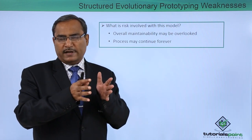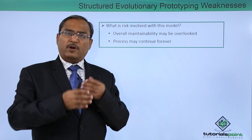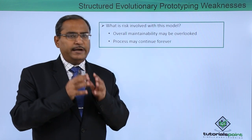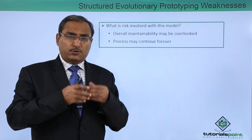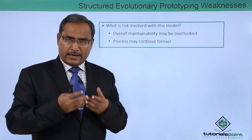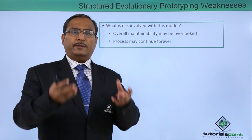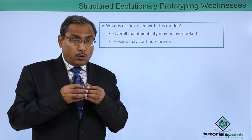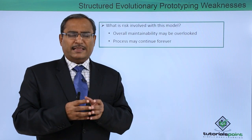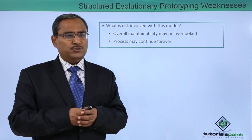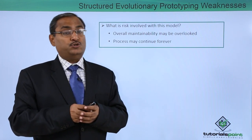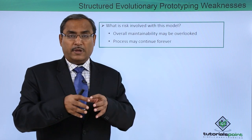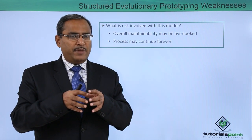During the requirement gathering phase, we have some set of requirements and we develop the prototype with basic and critical functionalities. When the prototype is given to the user, the user gives feedback, and new requirements may also come from users. As those new requirements get incorporated into the present version, the maintainability of the software may get overlooked when implementing new requirements that were not suggested at the very initial stage.